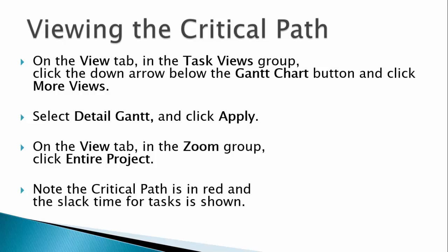You are probably wondering why the critical path isn't shown as a path through the entire project. The answer is we created a unique situation by constraining the Coordinate Magazine Articles task to a fixed period in time. The critical path now begins with this task, and all prior tasks have a lot of slack time. This is actually an ideal situation since we have a lot of flexibility built into this plan. We only need to be on target for the last few tasks to make the public web portal available to bring this project in on time.